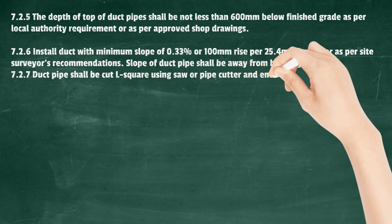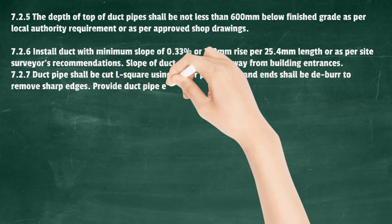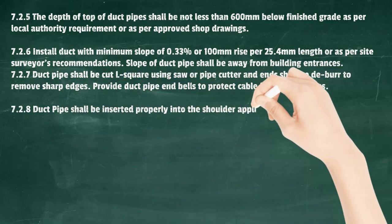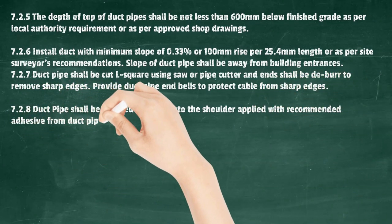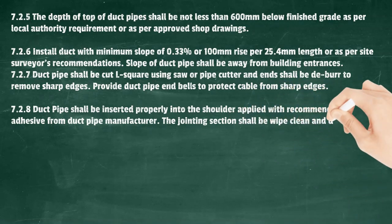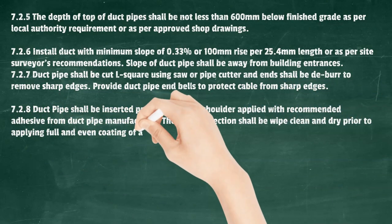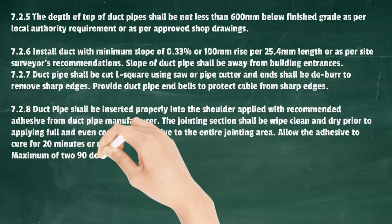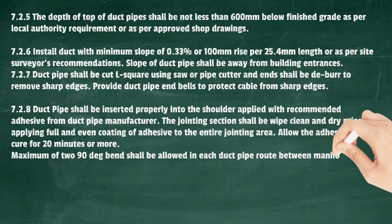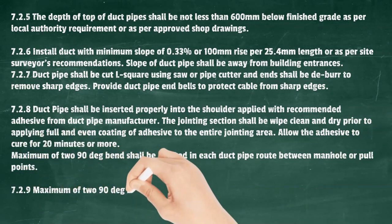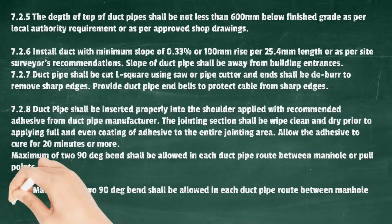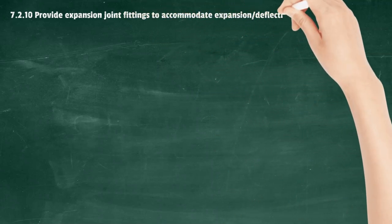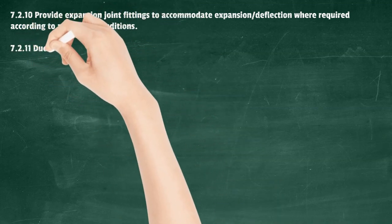Duct pipe shall be cut square using a saw or pipe cutter and ends shall be deburred to remove sharp edges. Provide duct pipe end bells to protect cable from sharp edges. Duct pipe shall be inserted properly into the shoulder, applied with recommended adhesive from the duct pipe manufacturer. The jointing section shall be wiped clean and dry prior to applying a full and even coating of adhesive to the entire jointing area. Allow the adhesive to cure for 20 minutes or more. Maximum 290-degree bend shall be allowed in each duct pipe route between manhole or pull points.